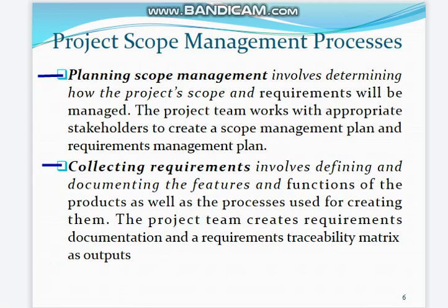Next is collecting requirements. Collecting requirements involves defining and documenting the features and functions of the products as well as the processes used for creating them. The project team creates requirements documentation and a requirement traceability matrix as output.